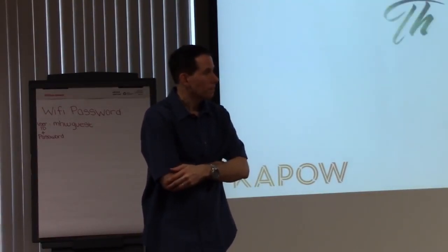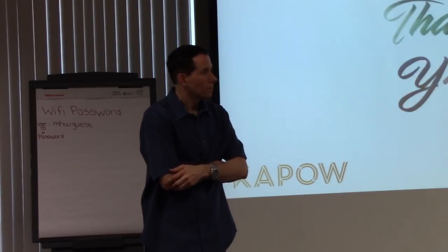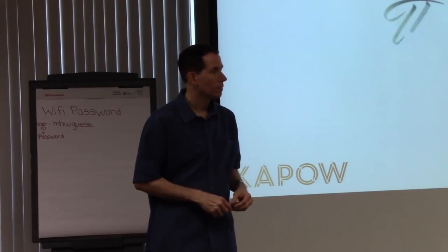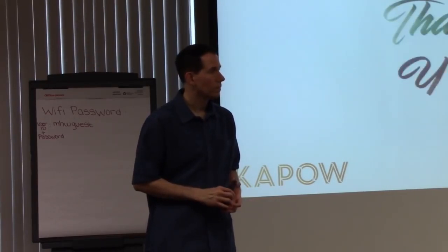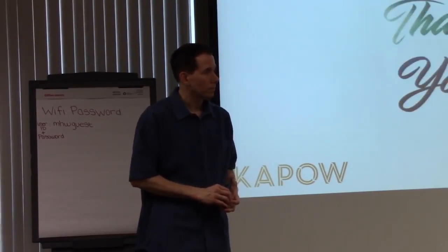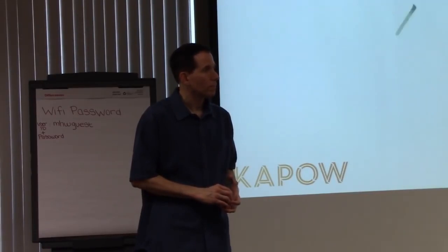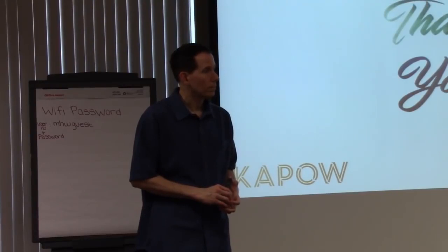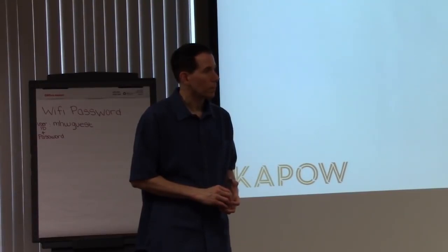That's kind of because we went from many years ago, went from waterfall into kind of agile world, and what we ended up doing with our stories is actually making design of required artifacts, and they would just get scheduled in. They get pointed and scheduled in, so we stayed on a 1 week sprint, but you wouldn't maybe consume that artifact until the next sprint.